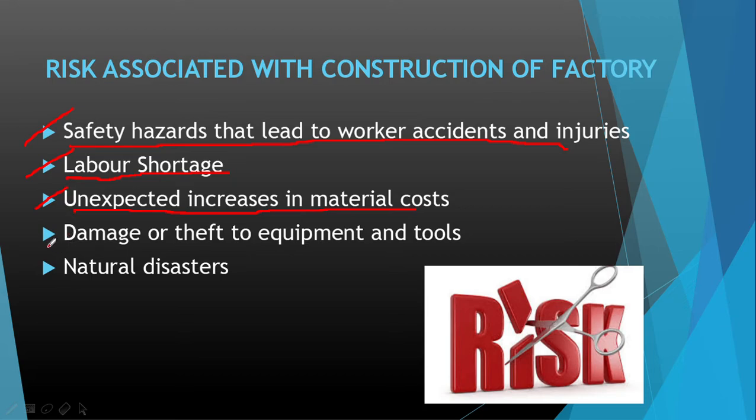This risk needs expert knowledge as purchasing materials beforehand may also prove to be disadvantageous if material prices fall in future. Damage or theft of equipment and tools is common at construction sites. Thus, proper surveillance is required. Accountability of team members is important to minimize this risk. Again, natural disaster is a great risk which cannot be avoided completely, but steps can be taken to minimize the